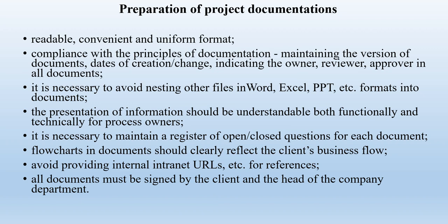When preparing documents, all project team members must adhere to the following principle: readable, convenient and uniform format. It is necessary to avoid nesting other files in Word, Excel, PDFs and formatting the documents. It is necessary to maintain a register of open and closed questions for each document. Avoid providing internal internet URLs. All documents must be signed by the client and the head of the company.